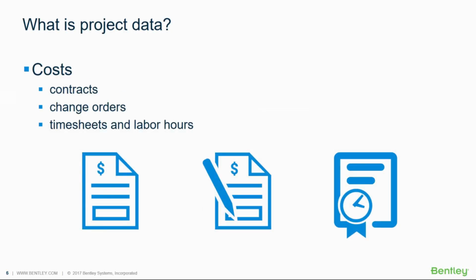Finally, we're going to look at costs, and really anything that affects the bottom line of the project should be tracked. And this can include the contracts, change orders, timesheets and labor, as well as any invoices or pay applications coming in from the contractor.